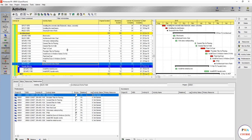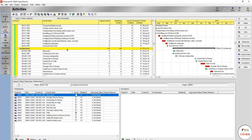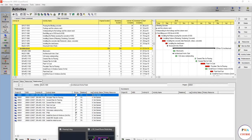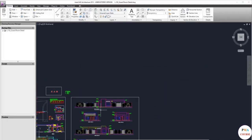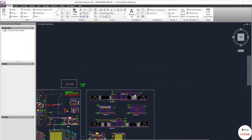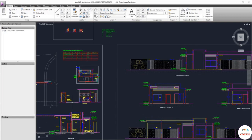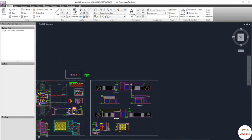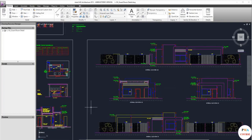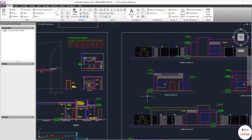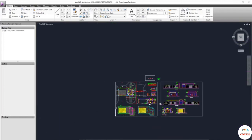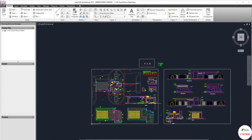I'll leave whatever remaining for you to complete and find out what's missing. Always keep in your mind the most important thing while doing a schedule is to make sure you have covered all of the scope. To know the scope, use the drawings, specs, and don't forget our lovely BOQ. The BOQ is very important to know the scope, but according to the contract documents and their priority, check with the contract administrator or the document itself. If it's FIDIC, you can check online to know the priority of the documents.